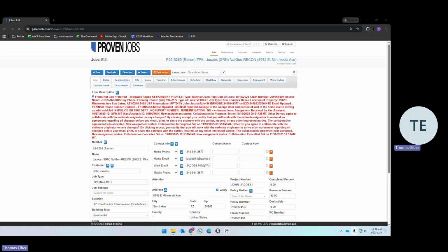So, very useful form. Next, production milestones and field reports. Those are constant. You complete one, it means that you're preparing for the next. Until the job is completed, you are doing field reports weekly, if not sooner, based on your production meetings with the operations manager and what they require from you.